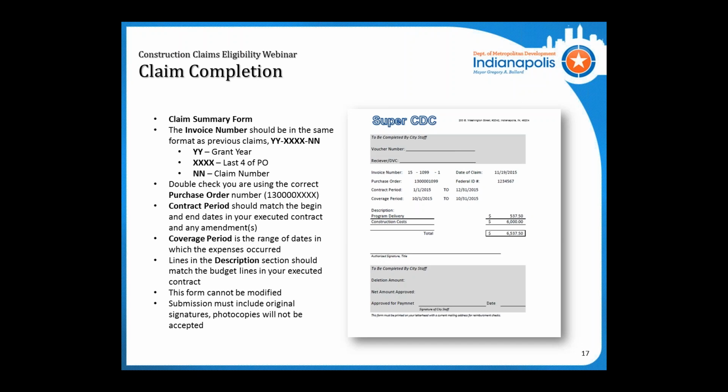So if you have your first expense started on October 1st and the last one was October 31st, you'll enter those dates as the coverage period dates. The lines in the description section should match whatever the lines in your contract budget are. So for homeowner repair, it'll be program delivery and construction costs. Please make sure those match up and are updated with any amendment that goes through.